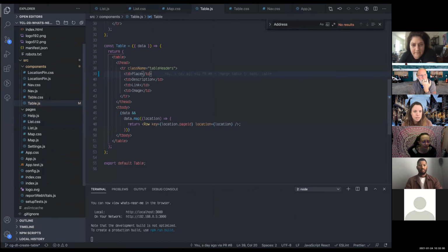The way that we're doing things, we still haven't decided as a group what our target is. But if we had things that were 2 days, then it's more likely you'd be able to get maybe 2 things done per week, right? Two days is still probably going to drag out into 3.5 days because of reviews and different things. But if we were aiming for that as our metric, or if we're comfortable with trying to chug along at one story per week, that should be our goal. We still should look at these and make sure that we think they're reasonably going to fit into that time frame.